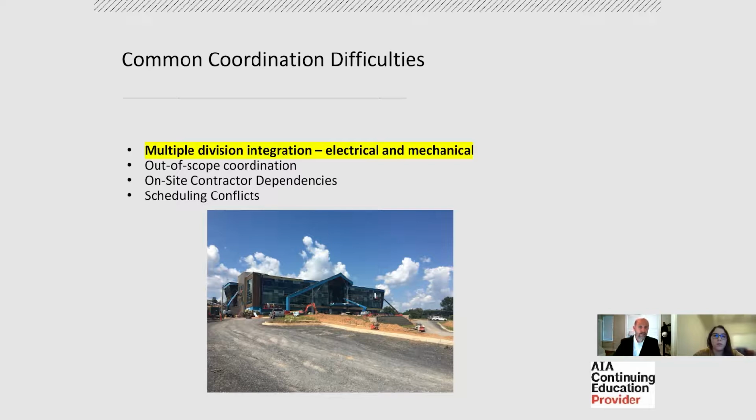There's also some dependencies that we require, but it might not be clear to the general contractor. That's another area where good communication from the commissioning provider or the CXA as an individual is needed, to keep everybody on the same page and have conversations about it. Like the GC might tell you that the fire alarm system is ready for functional testing, but does the GC understand that for me to do the fire alarm system, access control needs to be complete, or at least complete enough that unlocking of doors in the path of egress can be demonstrated for commissioning of the fire alarm system? And can the access control system be completed to that degree if the infant abduction system is not yet complete? Is it really done if its integrations have not been completed yet?